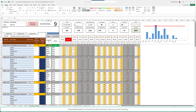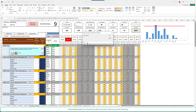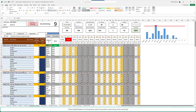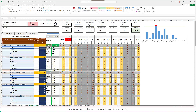To add a bug, click on the story and select 'Create a Bug.' Enter the bug ID or text; it will always display in red and count toward open defects. Assign it to someone and estimate hours — for example, assigned to Jason for four hours. Once Jason logs four hours, it shows hours remaining. Once all hours are spent, you can manually mark it as done, and open defects will show as none.